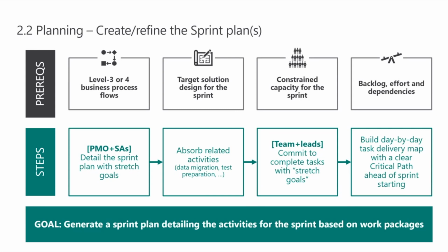And you add some stretch goals in there, and it's important you add those stretch goals, because in projects things happen, right? You can end up with a process that just gets blocked. You can't make progress on it because of something unforeseen. You then don't want dead time with the project. You want to be able to go to your backlog. There's something that's already groomed. You already know how you're going to be able to deliver that at a high level. You pull it into the sprint.